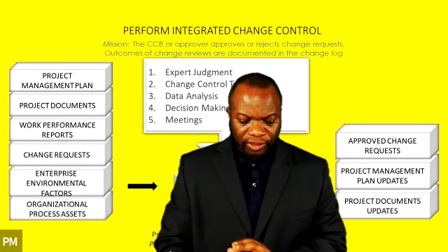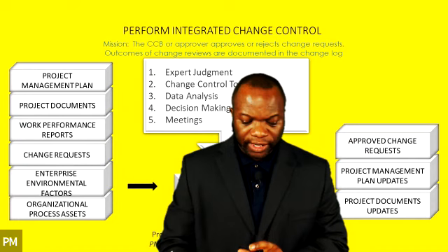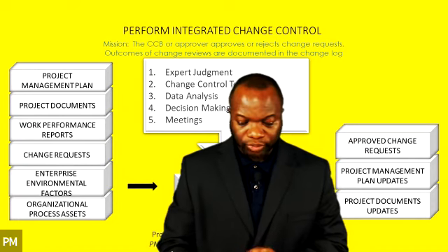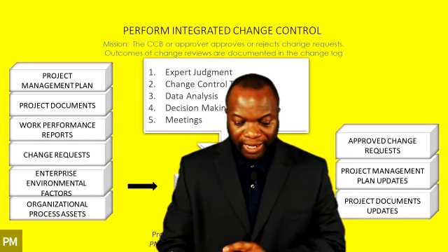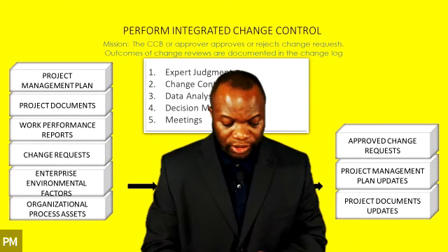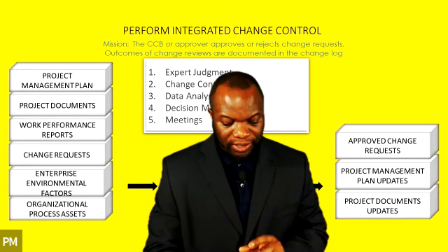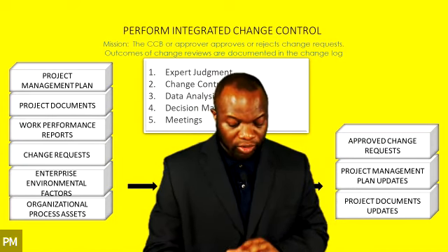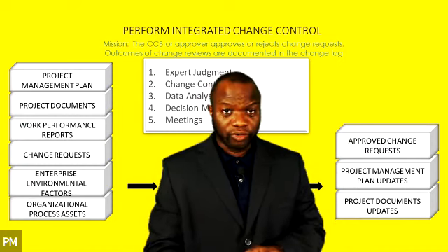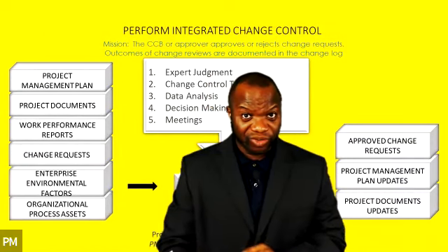Now, this one in the third paragraph on page 115, I want you to highlight it. Although changes may be initiated verbally, they should be recorded in written form and entered into the change management and or configuration management system. See that? That is important information to consider. Even if someone gives you a verbal change request, you want to say, hey, can you fill in a change request form? Then you want to document that stuff. That's what they're talking about.